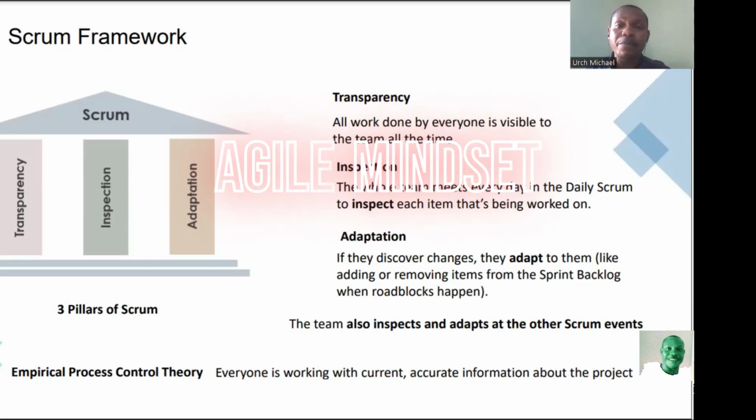In the predictive project methodology, if there are changes, you have to raise a change request, do an evaluation of the change, and know the impact of the change on the scope or the baseline of the project. Then you have to go to the change control board and get permission from them, explaining the impact of the change you're about to effect on the project baseline. They will look at it and may say, oh no, we don't have enough financial capability to handle this change, then we are stripping off that change. But if they have the ability, they give approval and we can go ahead and effect the change. But the process is just so rigorous.